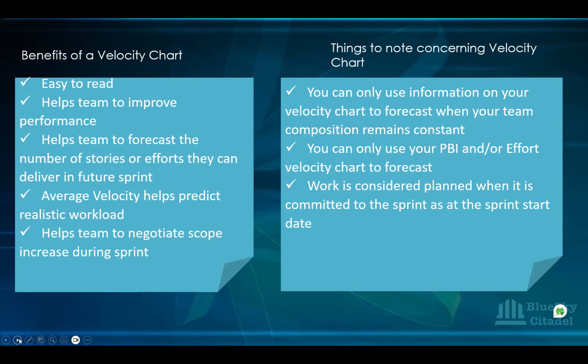So if we're going to take 80 story points in, then we have to have full capacity, if that is what we used to achieve that 80. When that composition is not the same, we can't take the 80 in. So that's some of the things you need to consider. You need to help the team to understand, and you need to protect or shield the team when you negotiate that with the product owner.